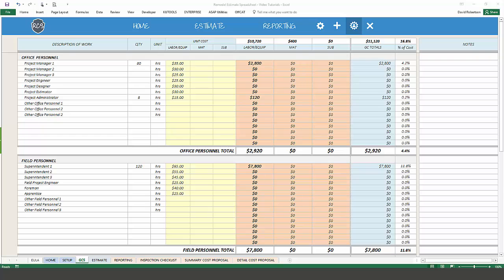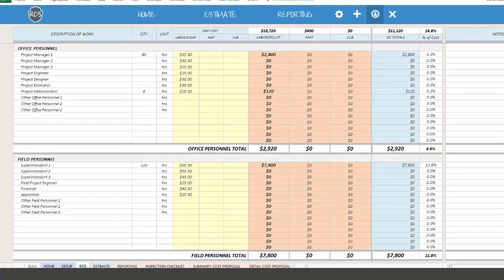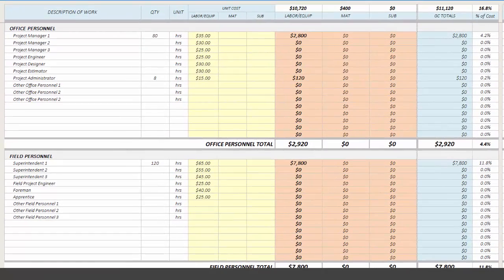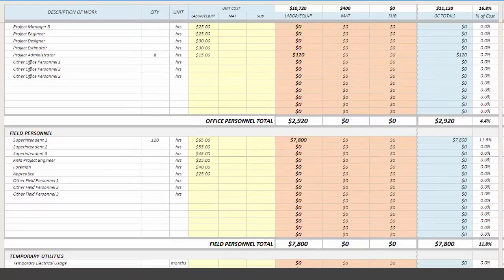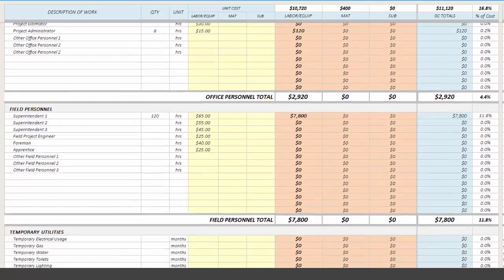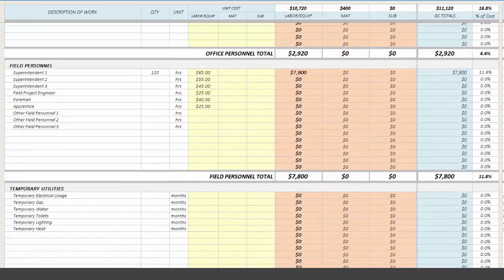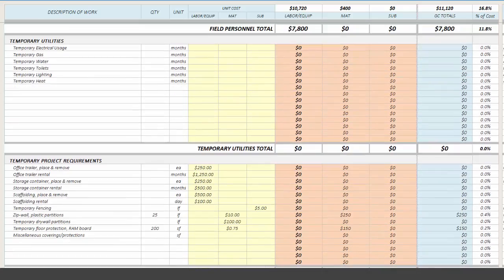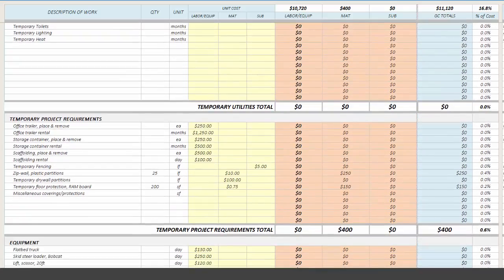Once you've completed your construction cost estimate, our general conditions estimator can be used to estimate costs for project and site management, field personnel, temporary requirements, and project cleanup.